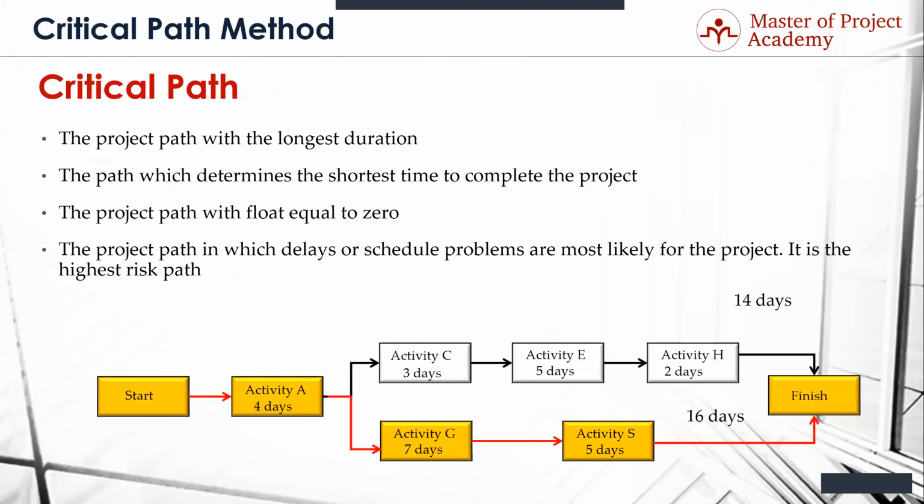This is the one you pay attention to as a project manager, because all the other paths in the network have some built-in float. 2 days in the case of this diagram, but you could have a float of a month on an activity. If you've got a float of a month, then you can kind of move resources around or switch schedules or do a lot of things. You have to understand where the float is in order to make it work.